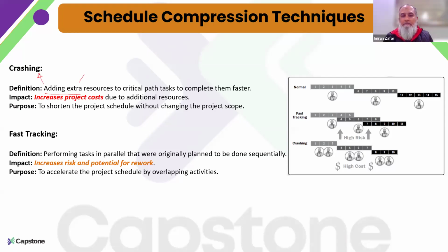Okay, let's say you are making your schedule for the first time. There you see that maybe I need to compress my schedule and add some resources on my critical path, and then you take it to your sponsor and any approvers for final approval. If it is approved, well and good, you can go ahead with it. If it is not approved, then maybe you need to tweak it and get the approval. Once the schedule is baselined, for any change later on you need to do the impact analysis, get the approval, and then start doing it accordingly.